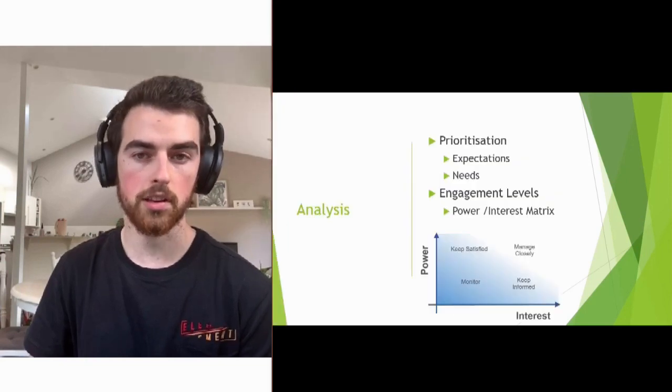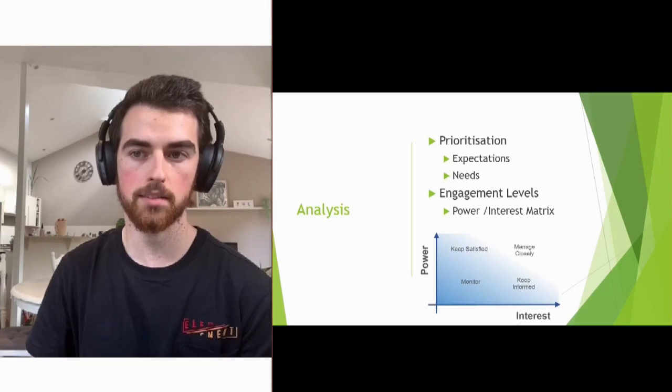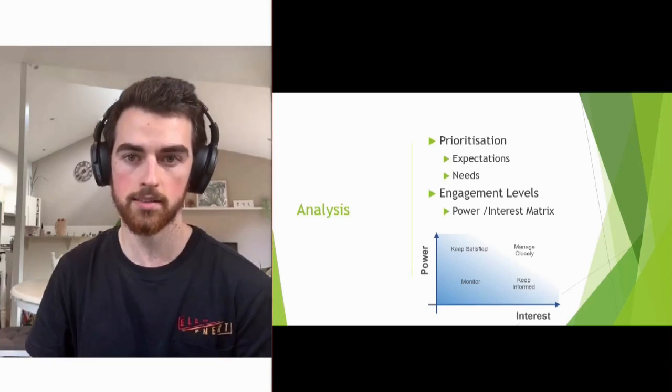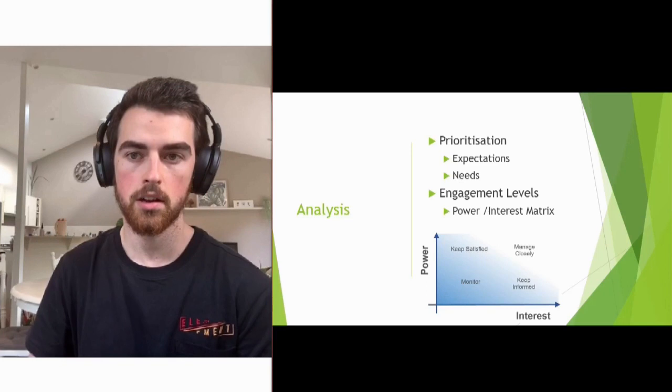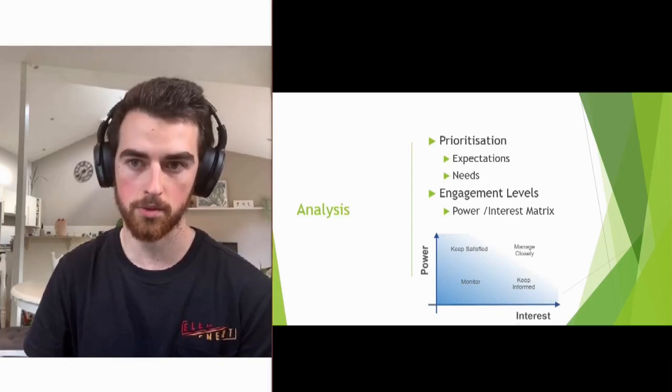Through this process, Cyber PM needs the ability to prioritize stakeholders, as this allows their expectations and needs to be managed effectively. Power versus interest matrices are a useful tool to accomplish this, and by ordering and distinguishing the stakeholders, specific engagement levels can be determined. This elevates the PMP standard for AutoGenesis's customers.